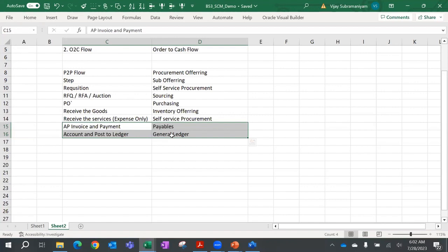Or maybe the engineering department wants 10,000 cement bags. You will not go to a local petty shop vendor to get 10,000 cement bags, right? So you will find the vendors who are eligible to provide 10,000 cement bags, and you will float the RFQ to such vendors only. So the requisition is the first step, even before RFQ.